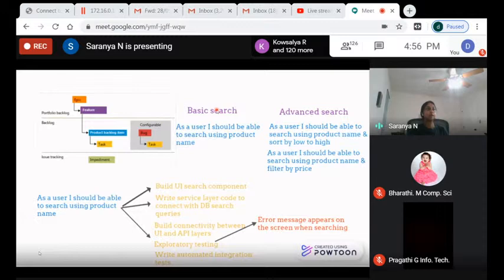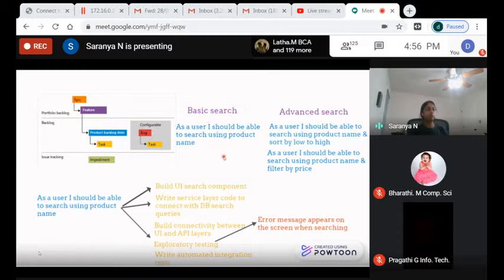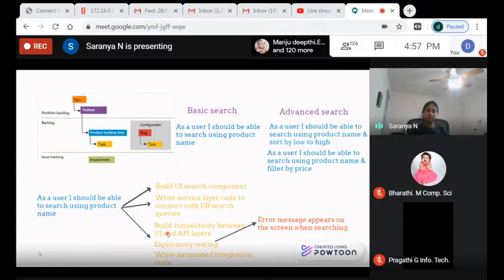Under each feature we'll have several backlog items. 'Basic search' doesn't mean anything actionable to a developer yet, so we break it down into product backlog items — user stories. Throughout this journey the development team works with the product owner to break it all out. One user story could be: 'As a user, I should be able to search using product name.'